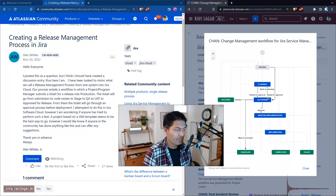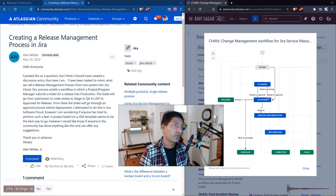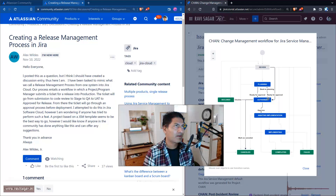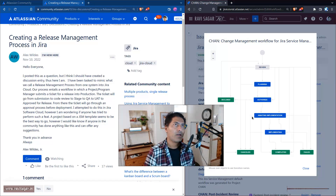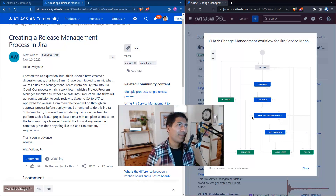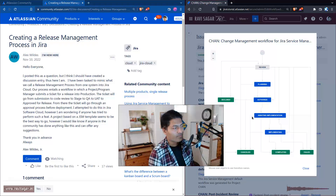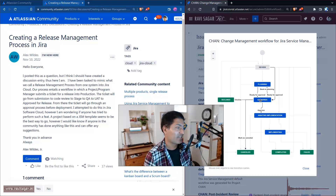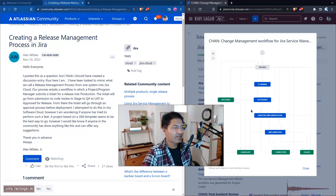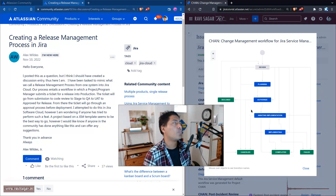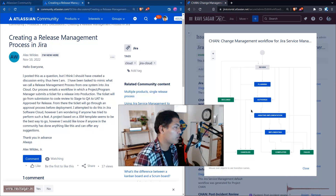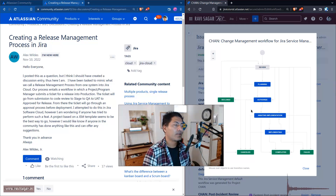Define it first on paper, then use Jira. When using Jira, look at features like workflow conditions, validators, and post functions. Workflow conditions define things that must be true before you can make a transition — for example, if a required field is missing, you can't proceed. Validators let you capture information during a transition. You may or may not need an additional app on Jira Cloud.